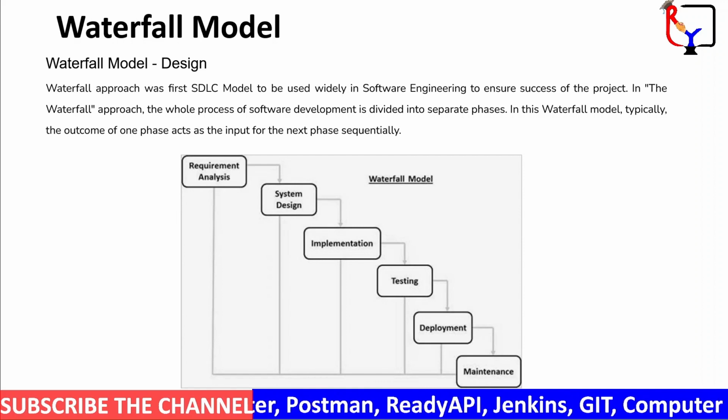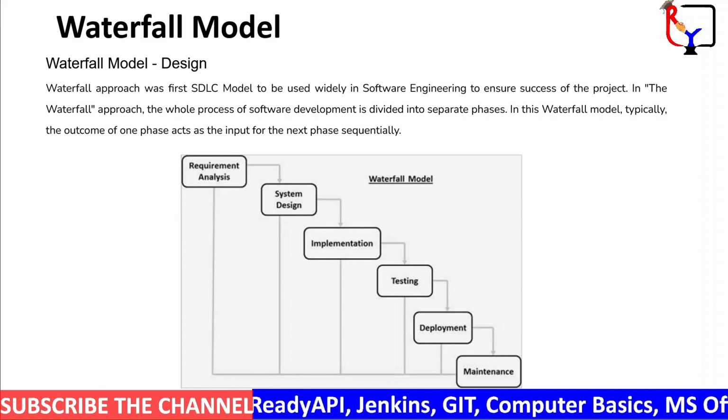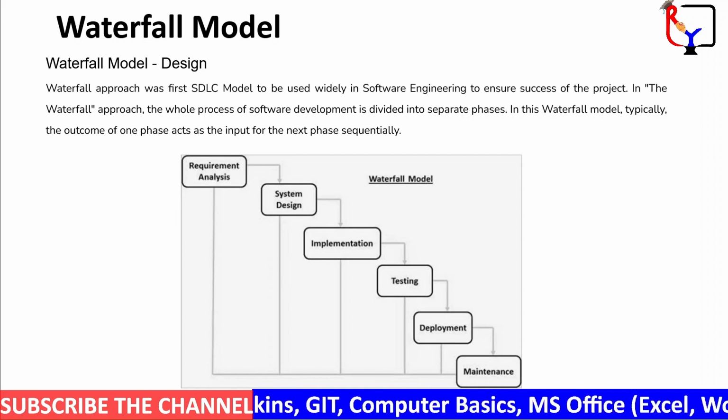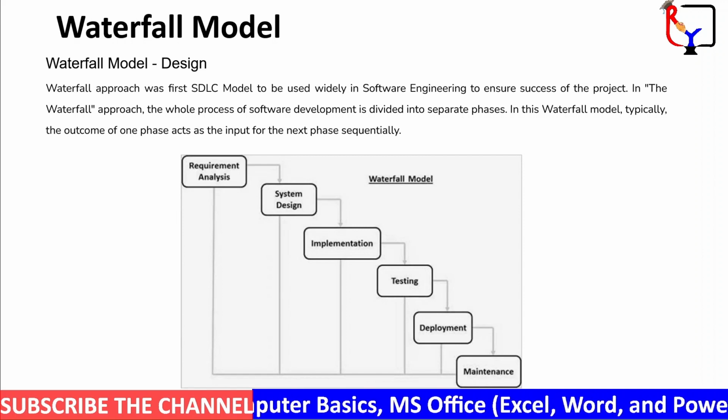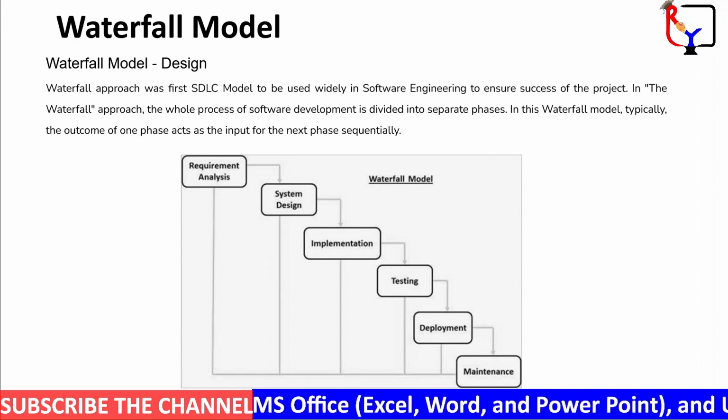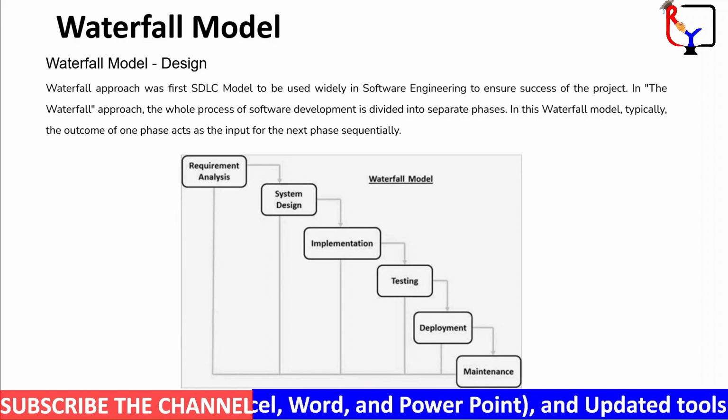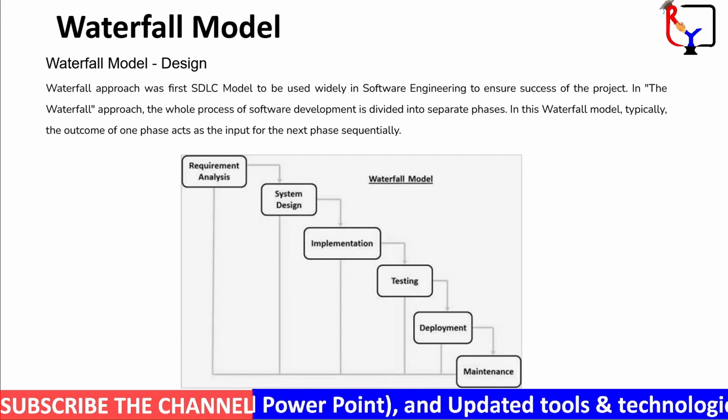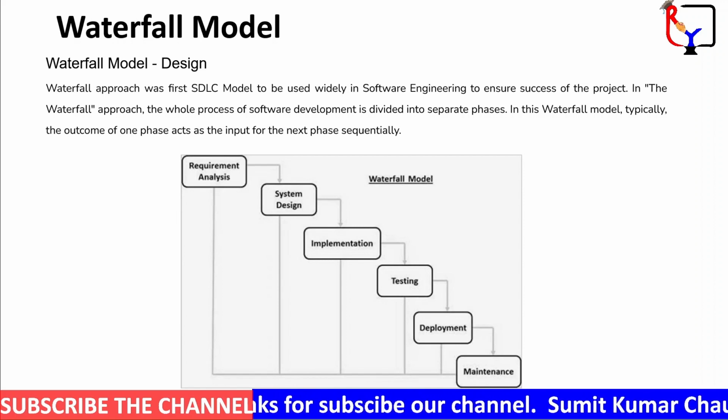Every stage is well defined with specific deliverables and milestones. The waterfall model is sequentially linear, meaning the next step cannot begin until the current stage is completed. A stage is complete when the goals are met and someone signs off for the project to advance.